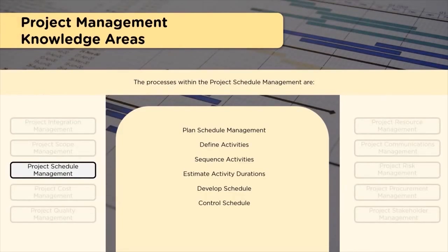We need to know what needs to be delivered. So the WBS element helps us. When the scope baseline is provided as an input here, taking that, activities are defined. Then the sequencing happens. Then when we say estimate activity durations, we speak about two terms, effort and